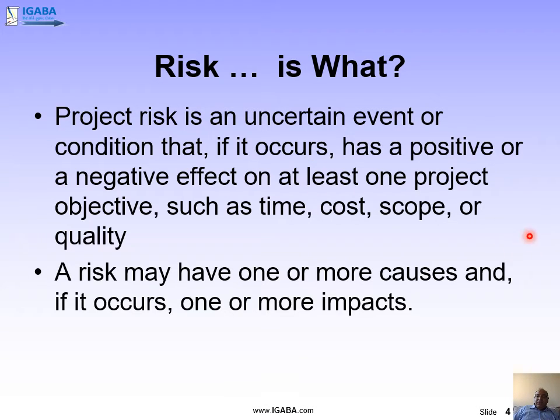That differentiates, for example, risk from issues. Issues are certain things that have happened, and of course, usually negative things, like if it's raining now and it's ruining your work or is delaying your work, then the talk is about an issue, not a risk anymore. So in projects, you would be keeping a risk register and an issues log.